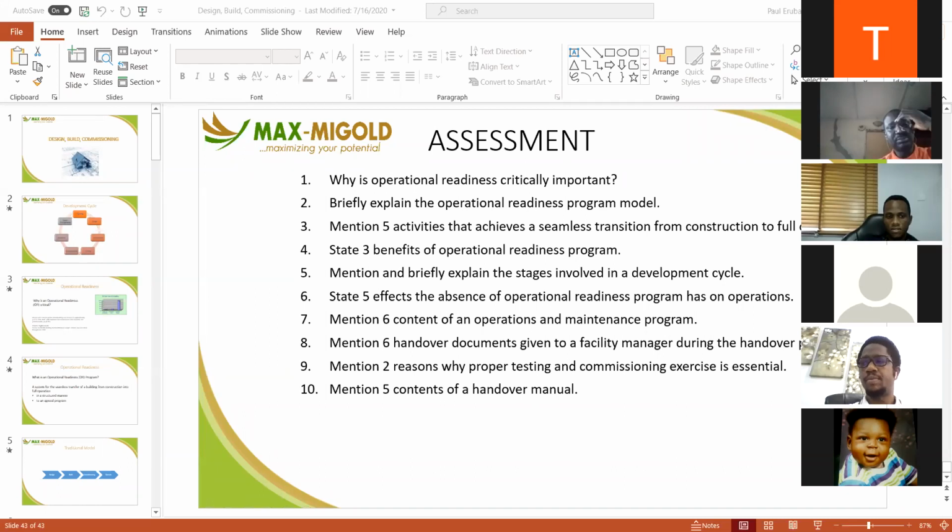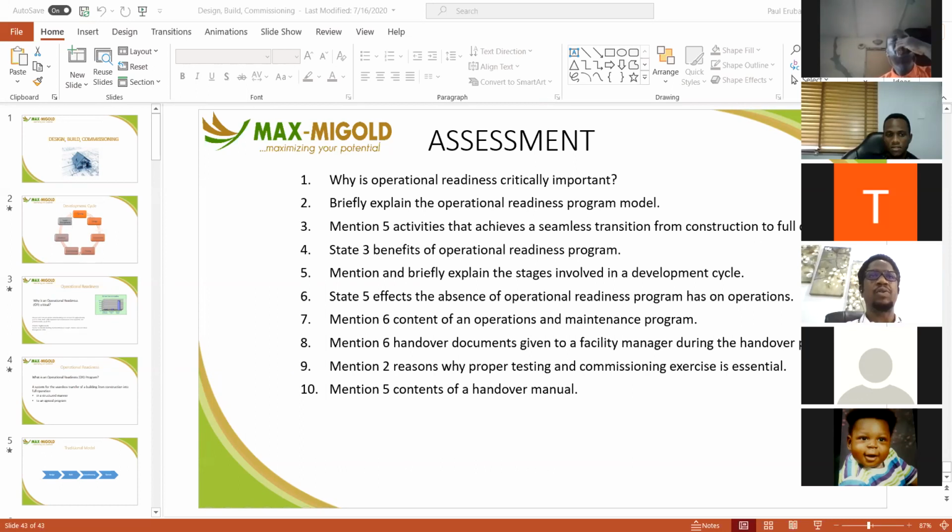The second part you spoke of, testing and commissioning, I don't understand the reverse you said. Commissioning should happen before handing over. Just refresh that for me. So testing can be done as soon as any asset is delivered within a project. If a generator is installed, it can be tested and certified, even if the generator is going to be used for the construction of the rest of the job. If a borehole is drilled as the first aspect and the water is going to be used for the construction, that borehole can be tested.